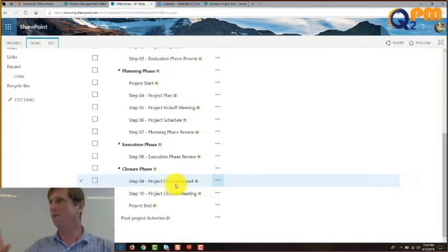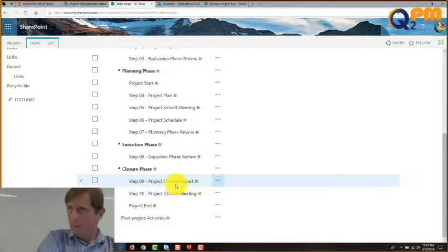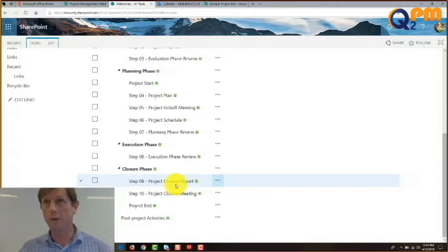Maybe there were 25 deliverables in this agreement, and we go through them one by one with the band, trying to keep them from, you know, turning back too much whiskey too fast. Okay, think, guys, focus. Do you agree we gave you all 25 items? And they go, yes, we did. Great, party's on. Okay, we're done.